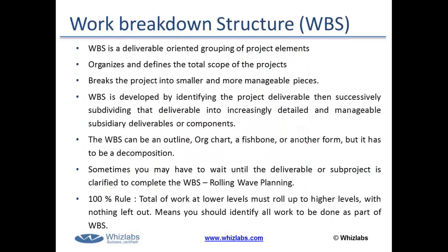Now let's understand what is WBS all about. WBS is a deliverable-oriented grouping of project elements. It organizes and defines the total scope of the project, breaks the project into smaller and more manageable pieces. WBS is developed by identifying the project deliverable and then successively subdividing those deliverables into increasingly detailed and manageable subsidiary deliverables or components.